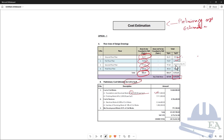These rates are just taken as examples for estimation purposes and can vary based on the contractor, location, and the client. If you need a very lavish finishing, this rate might not be sufficient. If you need a moderate or average finishing, this rate might be high. If you have already done similar projects, you can use that known rate. Otherwise, you can take help from a local contractor who will give you the per square feet rate.